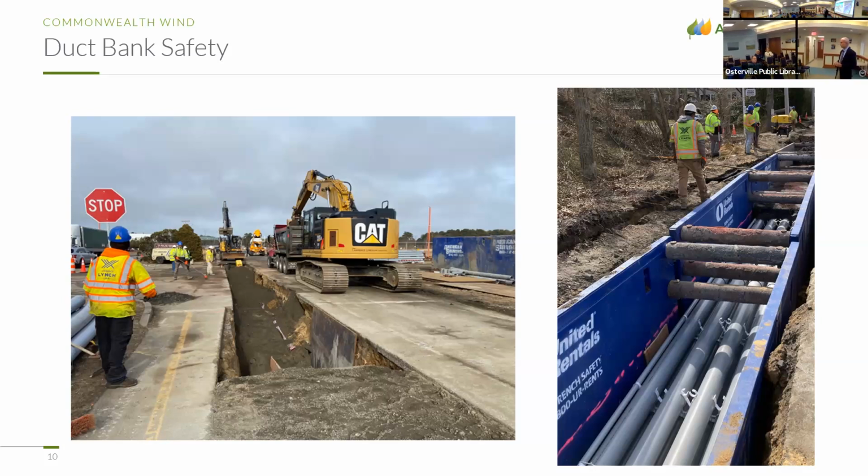Yes, sir, that's correct. And why don't you just have the cable be 6.7 miles long and avoid the splicing? The short answer is that would be a very big cable reel. We've got to be able to ship the cable to the job site, and we're limited by the shipping size. Right, and the cable reel looks like a spool of thread. Right, 12 feet in diameter or so.